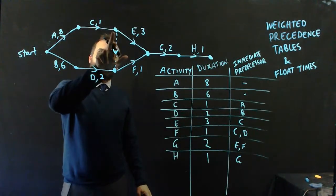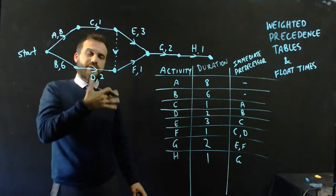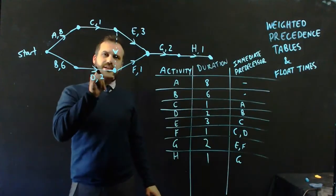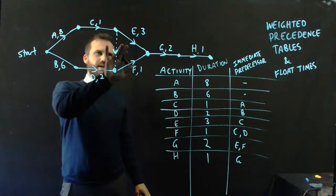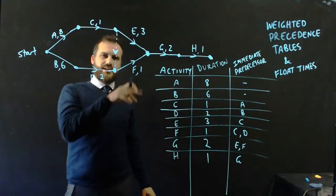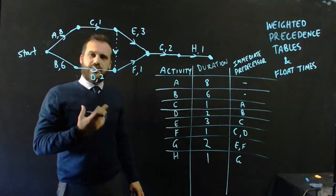So, the moment that C is complete, which is 9 hours into the project, or 9 minutes into the project, I can start doing E and F at the same time. But, look at E and F. E takes 3 minutes to do. F only takes 1 minute to do.